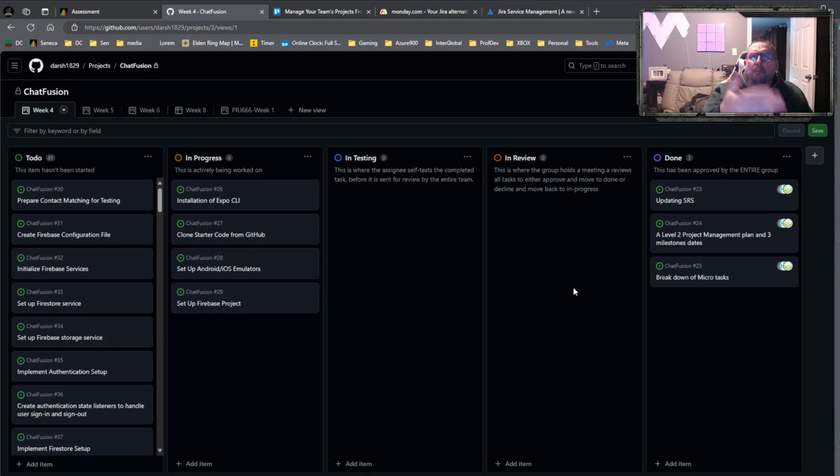Okay? You put it in review. Now it's just going to sit there, okay, until the next group meeting. In your next group meeting, one of your agenda items is to go through the review, each and every item in the review. The person who did that task presents it to the group, says, this is what it is, here's the code, this is what I did, this is how I tested it. Everybody can have a quick look. If everybody agrees and it's approved, it looks good, moving on, okay? You move that task from in review to done.